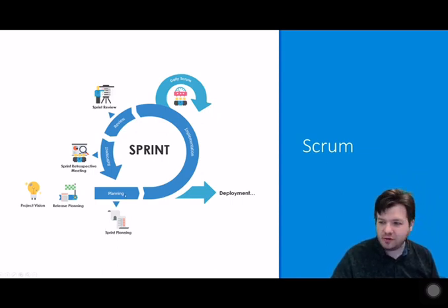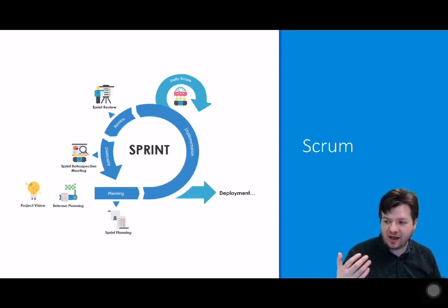Then you have your team members start working on those stories. Effectively you will work for a period of time, maybe a day, maybe multiple days, and then you will have a Scrum meeting to check on progress and see, okay, what stories have been completed, how far along are they, are you encountering problems or blockers that need to be dealt with, so you can track within a sprint how well progress is being made.